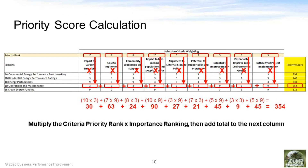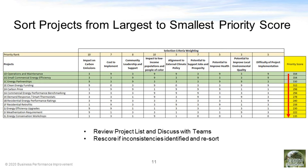For each row we calculate a total number called the priority score, and we use that to determine the best potential projects — the higher the score, the more important the project. After all the scoring is complete, sort the priority score column from largest to smallest and identify the top three to five projects. This is where you would want to review the project list with the project teams and stakeholders to make sure the scorings made sense. You may find some discrepancies that may need a rescore based on how the team was judging that particular project. Sometimes teams start off very meticulous and then as the scoring takes longer they get less consistent, so it's always good to review your scores at the end to make sure everyone was consistent across all the different projects. If there does need to be rescoring and the team agrees, that can occur.